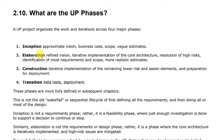In Elaboration, we look at the core architecture of the project we are going to build. We identify high-risk issues and try to minimize those risks. We refine the vision of the project and the core architecture. This includes iterative implementation of the core architecture, resolution of high-risk elements, identification of most requirements and scope, and defining more realistic estimates.